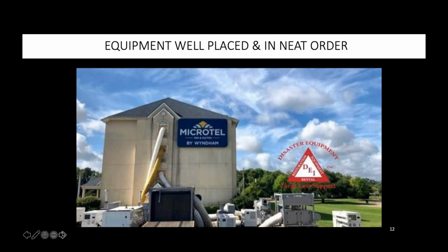So we chose to put all the equipment in one area of the parking lot behind it. The equipment's lined up neat and nice. It's spread far enough apart that they could get to the equipment and fuel it and service it. And on this one we chose to go through the windows so we could leave that bottom door open for fire escape while we were working in the building. That's important to do, and important to stay friends with the fire marshal, if you will.